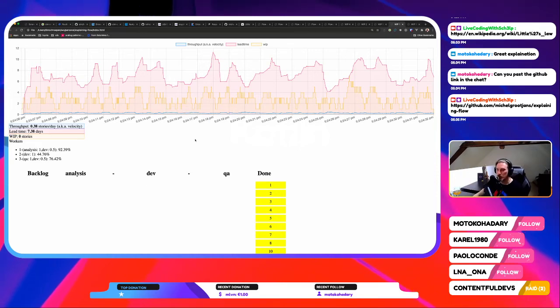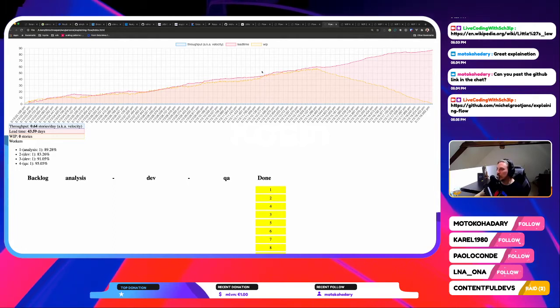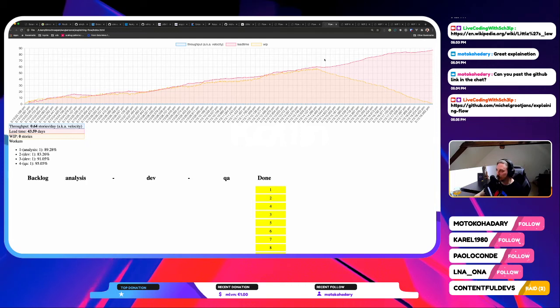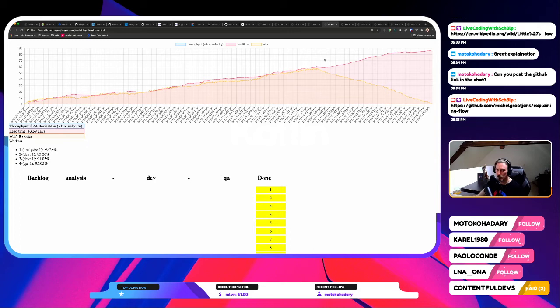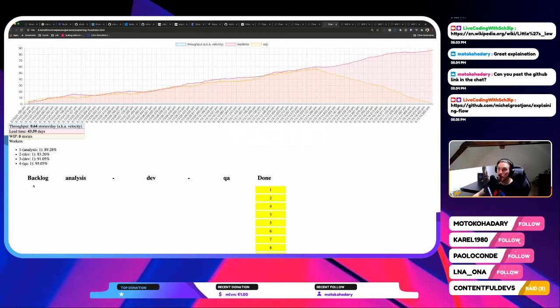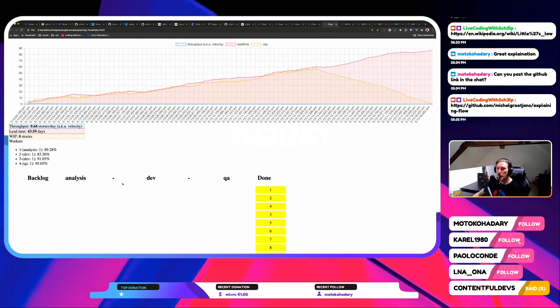And as we saw before, because work in progress is an indicator for delaying lead time, here is the graph to show that behavior: all of your stories will end up being delayed longer. So it might be smarter to just not pick up those items that you're depending on one team with in the first place. But the other thing is, even if you did and you learned about it, it's still not a good idea to pick up new work.